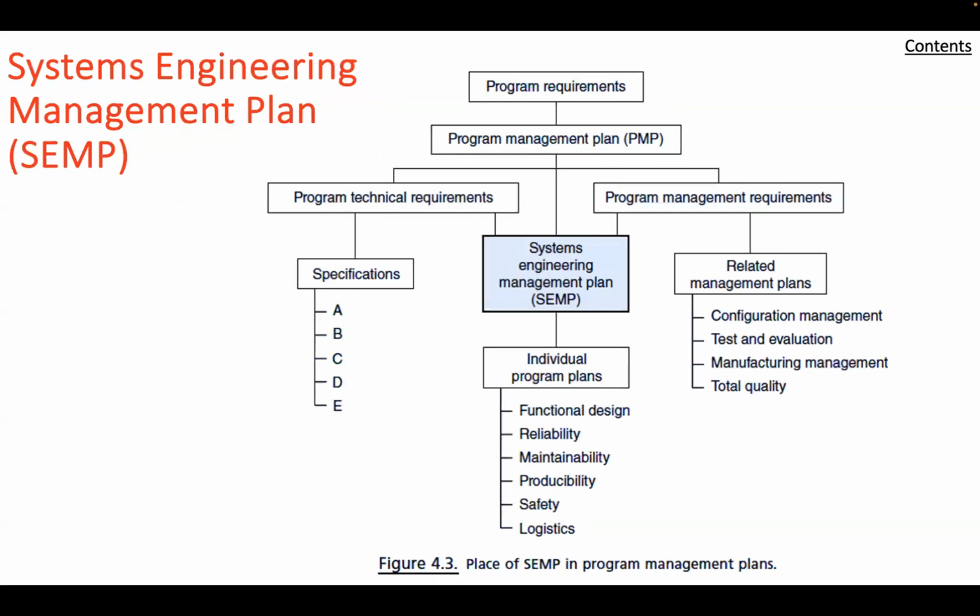Okay, now let's think about the structure of the system engineering management plan. The importance of having formalized plans for managing the engineering effort is emphasized by requiring the contractor to prepare a SEMP as part of the concept definition effort. The most important function of a SEMP is to ensure that all of the many active participants, subsystem managers, component design engineers, test engineers, system analysts, specialty engineers, subcontractors, etc., know their responsibility to one another.